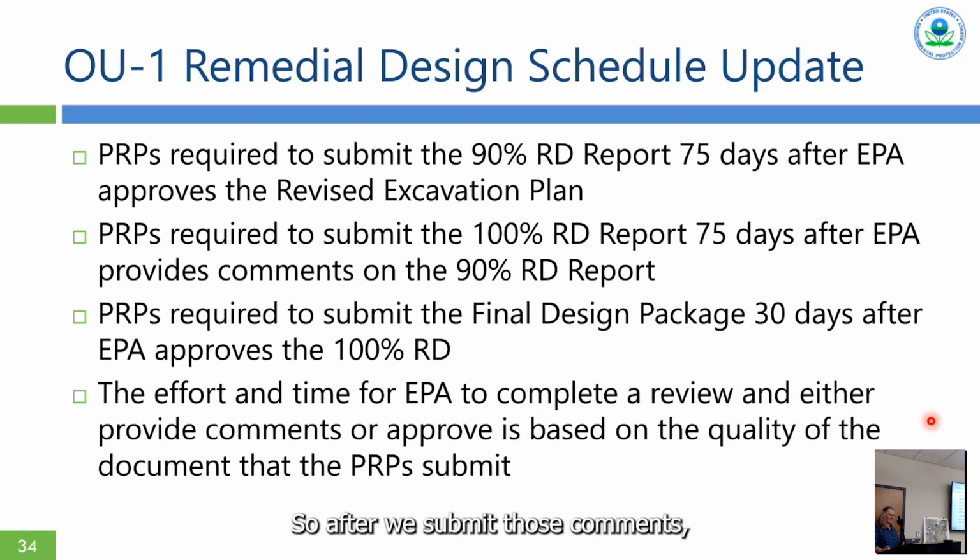So after we submit those comments, then they're required to submit us the 100% design 75 days after we provide the comments on the 90% design. And then after we provide comments or approve the 100% design, they have 30 days to send us a stamped version that is, this is a go.